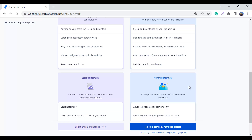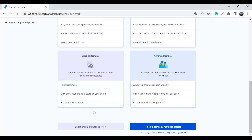For roadmaps, if you want a basic roadmap showing only epics and stories in a chart format, you can go with team managed. If you want the advanced roadmap, create a company managed project — it's a great feature that I personally use a lot, but it comes with the premium plan only, not the standard. Regarding the board, in a team managed project you can only see your project's issues on the board, but in a company managed project you can pull issues from anywhere in the Jira instance, including other projects.